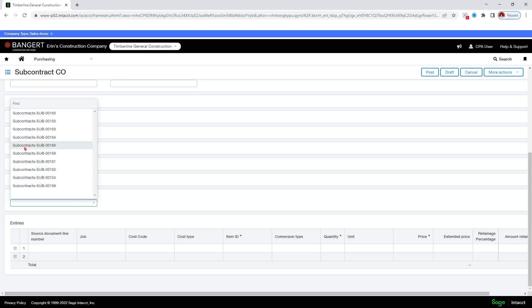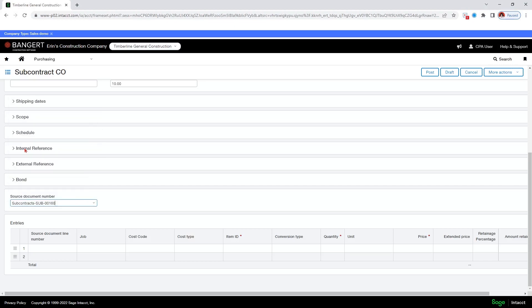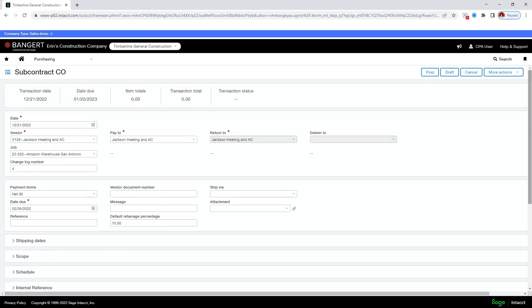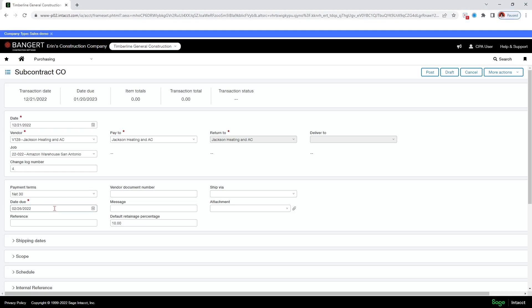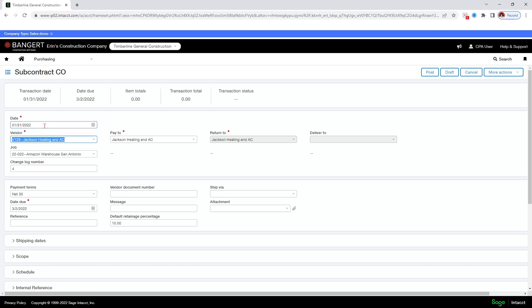So let's say 160 again. Now, when I go up to the top, it has filled in all of this information for me. I also have a new changelog number because I posted number three. So you just want to remember the date needs to be prior to the due date. So in this case, it is not on this one. So if I change this one to 131.22. There we go. Okay.